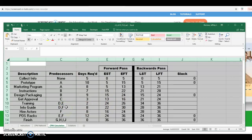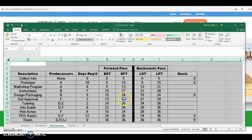Same for info guide — it has two predecessors, D and F: instructions and get approval. Instructions finishes on day 22 and get approval finishes on day 16. So info guide has to start on day 22, has an eight-day duration, and finishes on day 30.